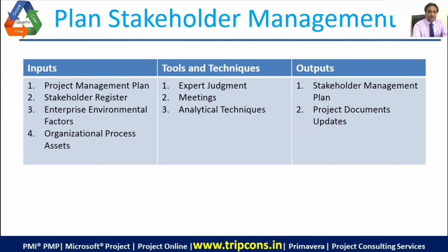You take the following inputs. You take the project management plan, you take the stakeholder register, and you apply the enterprise environmental factors and organizational process assets, and you have an expert meeting with your expert judgment, basically after meeting with your team members, and you apply the analytical techniques in those meetings.